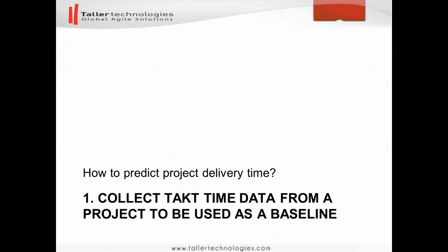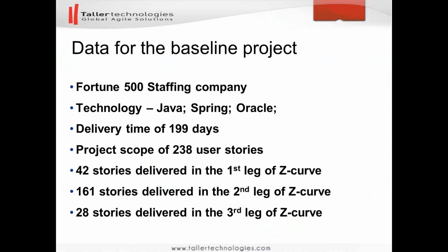So let's follow the algorithm. This is the data that I just showed in Excel. Our baseline project was a project for a Fortune 500 company. The technology used was Java, Spring, and Oracle. Delivery time was 199 days. Project scope was 238 items, and you see how the scope was divided over the three legs of